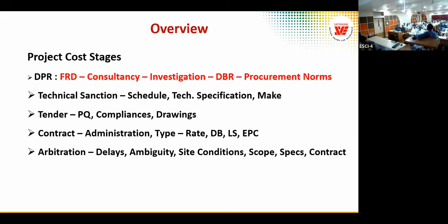In fact, the consultant should be penalized if he makes changes to the drawing submitted in the DPR. Why I'm mentioning this is, when you audit, these are the points which will affect the cost and the timelines, because any change in the drawing will lead to RFIs.